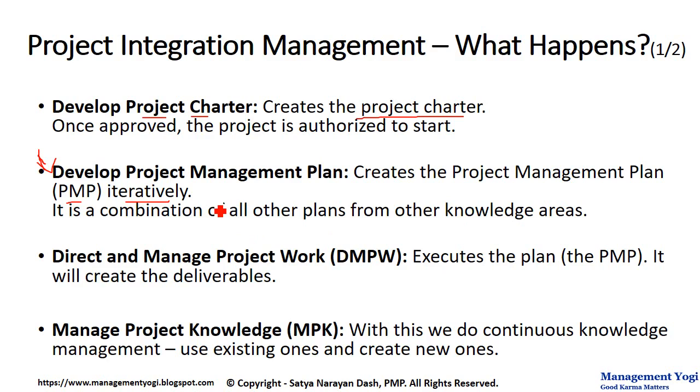Next, we take the project management plan and move to the next process of direct and manage project work, or in short, the DMPW process. This process executes the project management plan, and this process creates the deliverables. Project is all about deliverables. As I have said earlier, project is about deliverables, program is about benefits, and portfolio is about meeting the strategic business objectives.